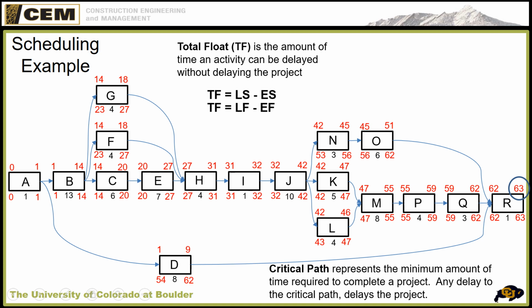So there's a saying out there, who owns the float? And usually whoever gets to it first. So if the landscaper says, you know what, I can't be here till day 50, well, let's change that. If the landscaper says I can't be here till day 40, then the GC might say, okay, that sounds okay. So they'll start on 40, end on 48, and that is okay. So whoever asks to take the float first usually wins.